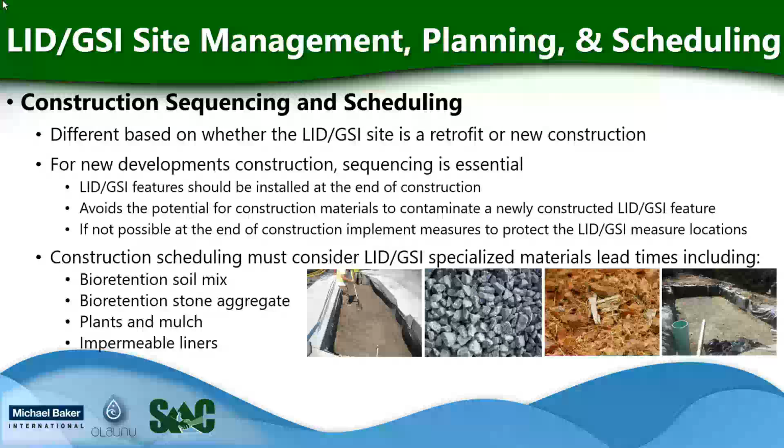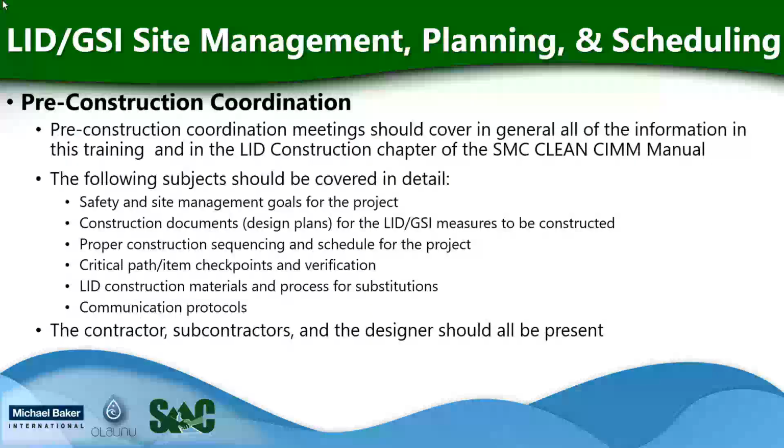Another element of site management planning and scheduling is the essential element of pre-construction coordination. Coordination prior to commencing construction of LID GSI measures is critical to ensure proper installation and protection of LID and GSI BMPs during construction. Protocols for communication and submitting and answering requests for information should be discussed during the pre-construction coordination meeting. Pre-construction coordination meetings should cover in general all the information in this training and in the LID construction chapter of the SMC Clean CIMM manual.